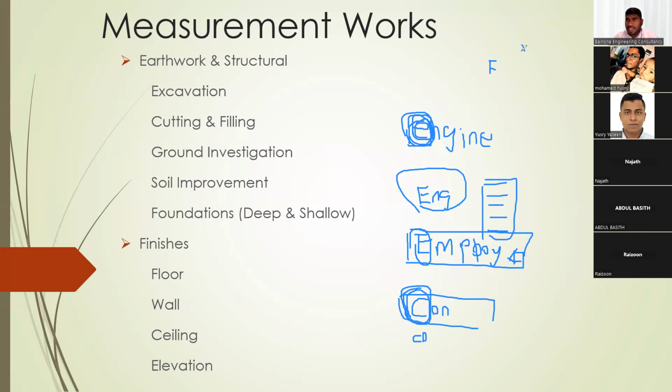So one party we have seen is the Employer, another party we have seen is the Engineer, another party we have seen is the capital C Contractor. There are other parties we call subcontractors, who have a direct contract with these people. These subcontractors can be named in various ways. We can say nominated subcontractors. Nominated subcontractors mean the client nominates them. Nomination is simple English, you can go and search it. Nomination means somebody is proposing someone. Like in an election, we go for a nomination, saying that for this election I'm going to contest. This is a kind of nomination. Similarly, nomination means the client is nominating this company. So these are the nominated subcontractors.